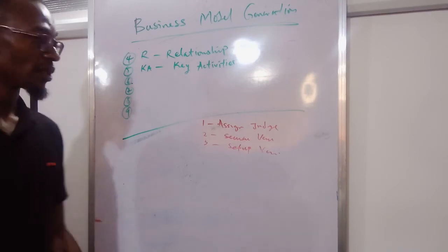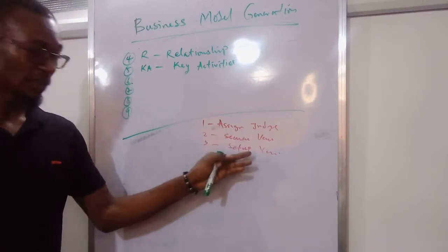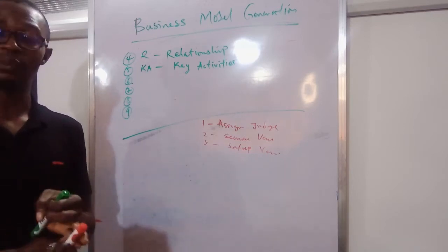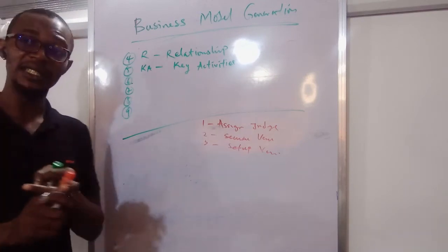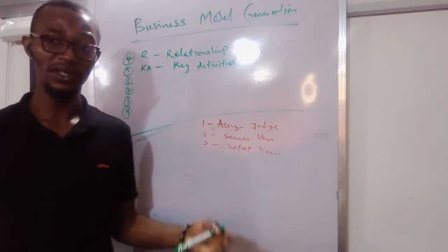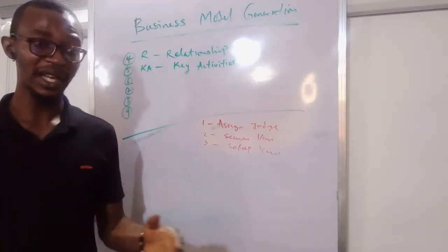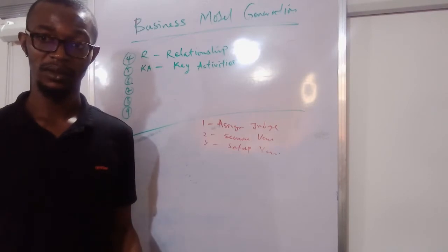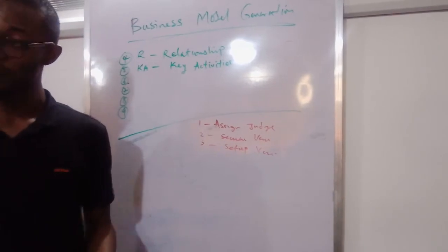So you just saying venue, we can say that there's more to venue. Securing the venue probably means you have to make payments. Making the payment alone is an activity on its own. Inspecting the venue itself is an activity on its own. Planning the setup is an activity on its own. Decorating is an activity on its own. When people are coming to the venue, mobilizing them, depending on the arrangement you have, is an activity on its own. So you need to be able to list out all the activities involved in that project, then break them down into